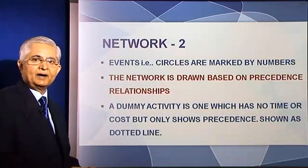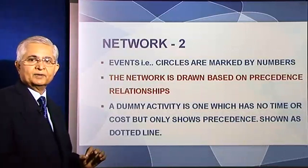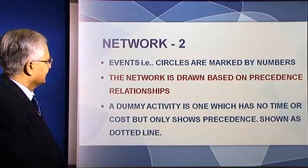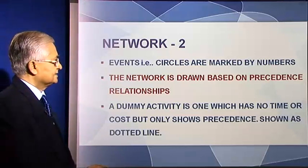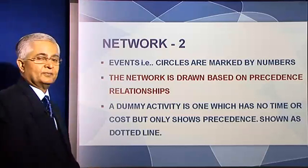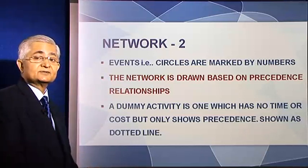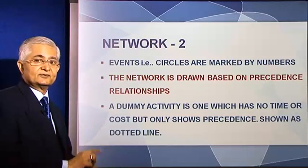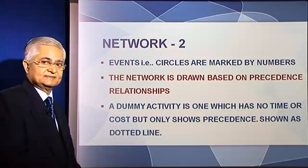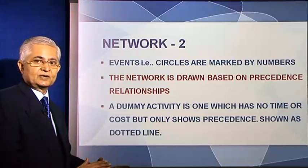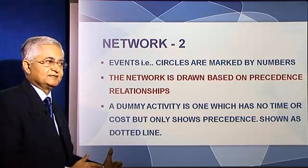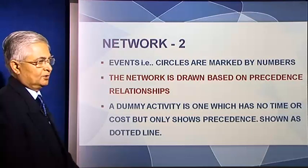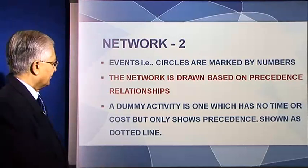These events are marked by numbers: one, two, three, four. The network is drawn on the basis of the precedence relationships. We have established the precedence relationships in the WBS — which activity should come first and which activities are linked. On that basis, the network is drawn.